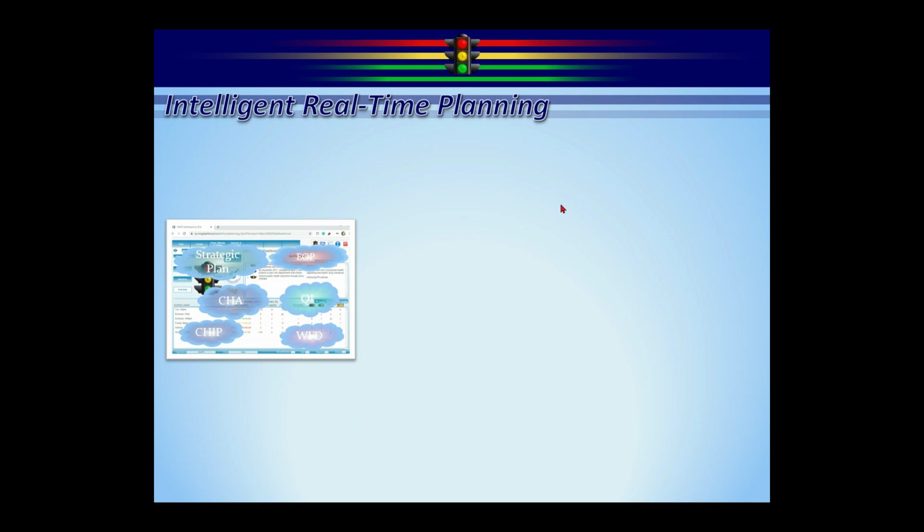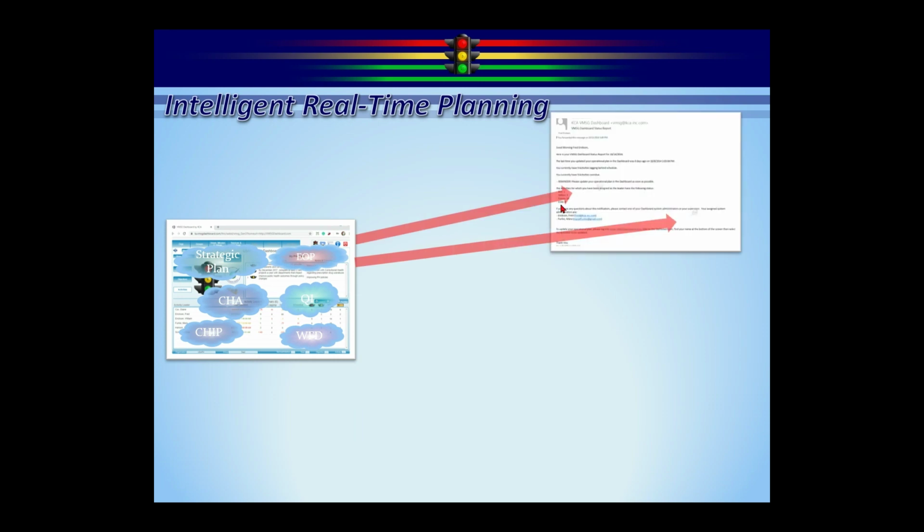And what it does is ask 3 questions. Number 1, has this person been in the last 30 days and updated their stuff? Number 2, does this person have anything that has fallen behind schedule? And number 3, does this person have anything that's overdue, meaning today's past the ending date? If none of those are true, no spam. If any of them are true, emails go out. Emails can go out to internal folks as well as external partners.